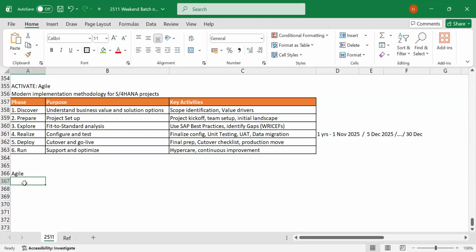I want this kind of roof. I need this kind of POPs. You can explain all those things, whatever you need. And once they say the first floor is ready, which is ready for a housewarming, literally everything is completed in the first floor, including interior. In waterfall methodology, what happens? They don't do all the interiors and everything for one floor at a time. What they do is, all the floors I'll construct first. Then I'll start all interiors at once. All plumbing I'll do at once.